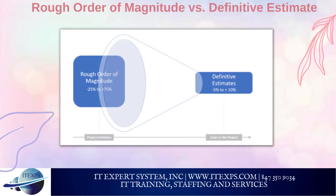Rough Order of Magnitude vs. Definitive Estimate. The obvious difference between these two types of estimates is accuracy — the ROM is rather inaccurate with a broad range of possible outcomes. It is therefore typically used in project initiation phases where a ballpark figure is sufficient to get a project started. The definitive estimate is determined in the course of the project when more information and resources for accurate estimates are available.